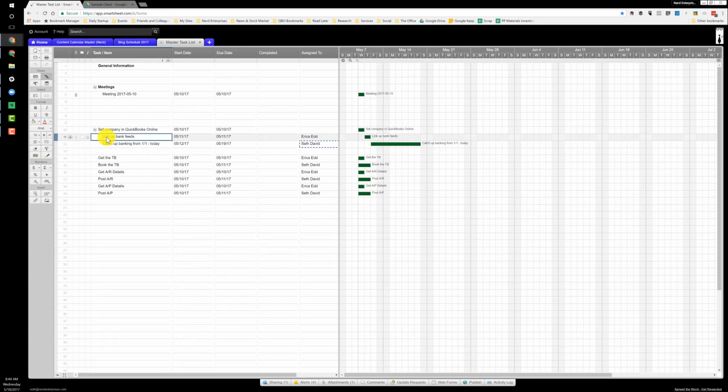And of course, these projects can be filtered so that we can eliminate things that have been completed. If you notice, I have a completed column, which is also a date-based column. You can do a checkbox. Most people are inclined to do a checkbox, so you just check it off that it was completed. I like to have it be based on a date so that I can see very clearly this was the date that it was completed, and I can sort of compare that with the due date and start getting a general feel of whether or not we're getting things done on time, or if something is slowing us down. I want to know about that so we can address it and try and figure out what's going on. Are we being too aggressive about our due dates, or are we not being efficient about our tasks and projects?